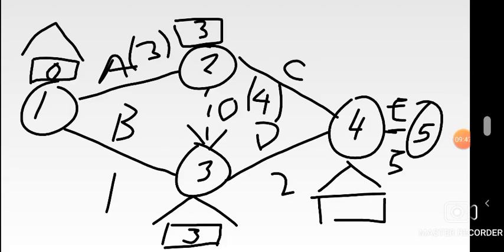So I said 3 plus 2, that route is giving me 5. The earlier route, if you noticed, gave me what? It was 3 plus 4, which gave me 7. We take the higher of the 2 routes leading to 4, which is 7. I even allocate 7. Okay, go to the last node.